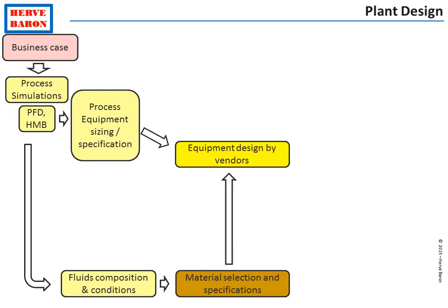Once the vendor has performed its design, he is able to provide dimensions of the equipment to the engineer, which enables defining the plant layout.